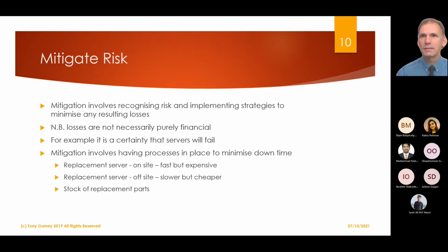It's a case study in how not to do it, because that failed on so many levels. Having all your systems in one place, public facing, internal, security, all of them running in one place, that's a fail. Being unable to quickly react to downtime, that's a massive fail.